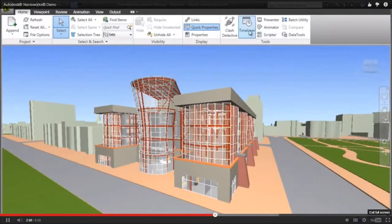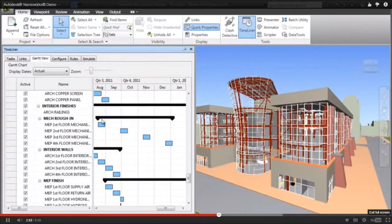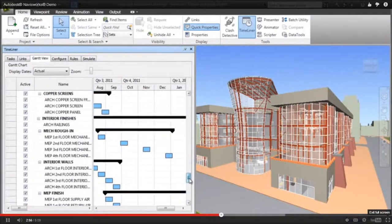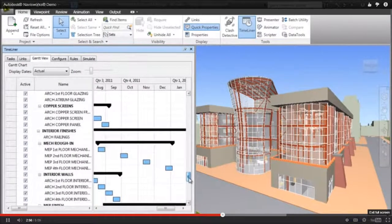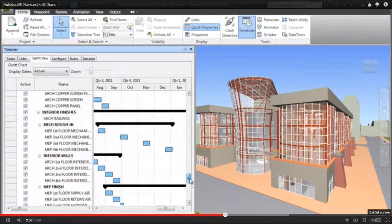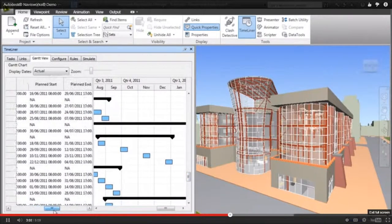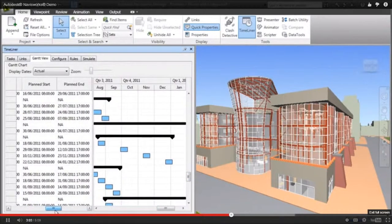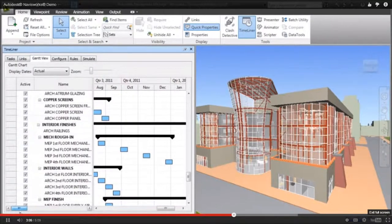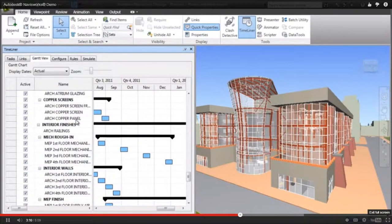As mentioned earlier, integrating design and construction models with construction schedules from third-party planning applications enables project stakeholders to visualize and validate their plans, and also simulate alternatives to prepare for what-if scenarios and identify optimum schedules. Here you can see the schedule in a Gantt chart within Navisworks, with each task linked to the design elements within the project model.